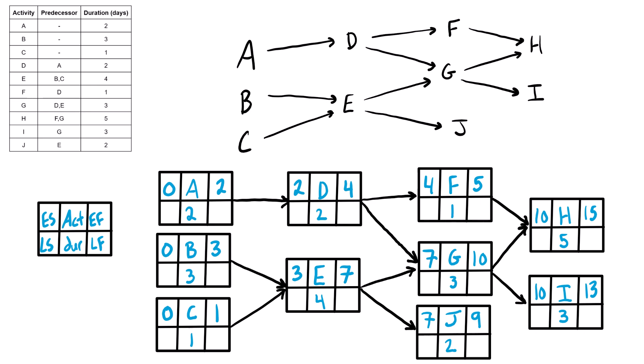Now we look at each of the three final activities — H, I, and J — and their early finishes: fifteen, thirteen, and nine. When we have more than one final activity, we take the largest early finish and bring that into the late finish of all of them. So fifteen goes into the late finish of H, fifteen into the late finish of I, and fifteen into the late finish of J.